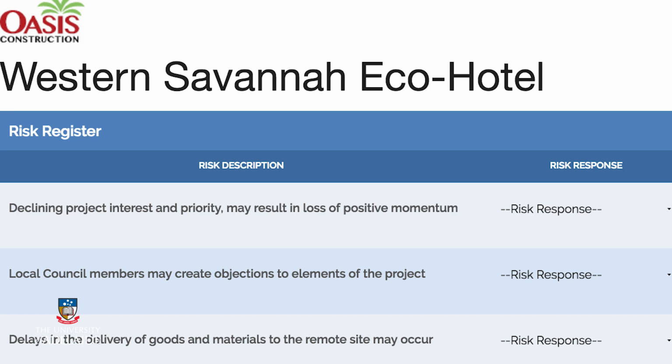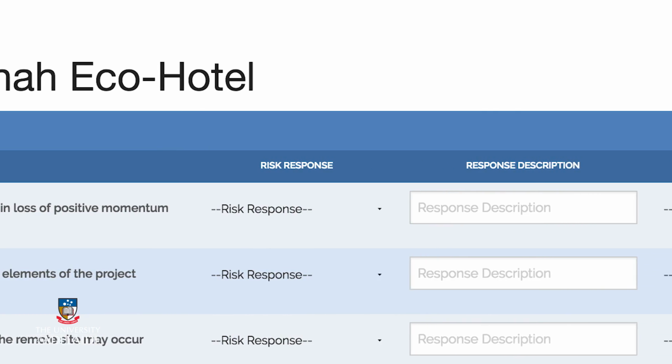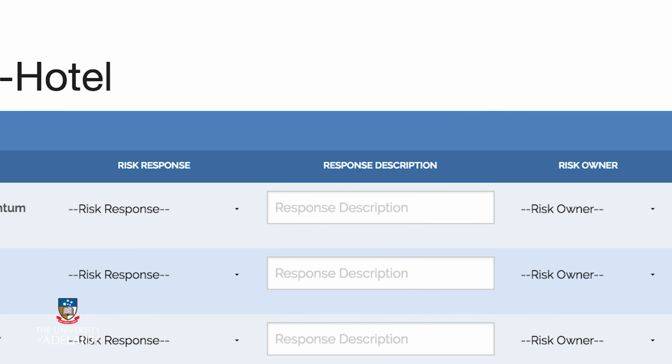The responsibilities of risk owners include the assessment of their risk and subsequent response, and reporting to you, the project manager, on a regular and continual basis so that you are aware of the status of any risk at any given time during the risk management process and project lifecycle. Risks should be discussed as part of the weekly progress or status meeting, during which the risk owners will provide updates on the respective identified risks.